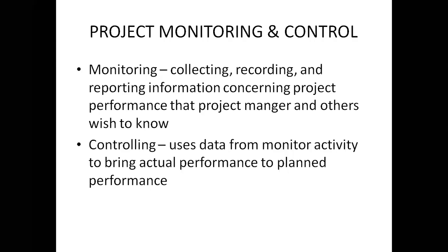So in the monitoring process on a regular basis, first we have to collect, that is get data about the current status of your project. Second one, measure and compare, that is compare with the baseline plan, highlight any deviation, make a projection based on current data. Third one is assess and replan. So decide whether corrective actions are necessary. If so, plan, document, and take the corrective action.